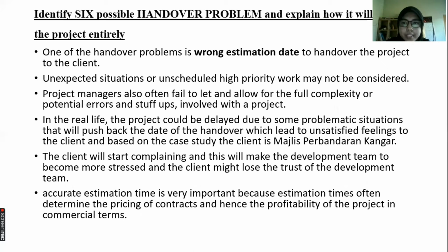Next, identify a possible handover problem and explain how it will affect the project entirely. In my opinion, one of the handover problems is a wrong estimated date to hand over the project to the client. Unexpected situations or unscheduled high priority work may not be considered. Project managers also often fail to allow for the full complexity or potential errors and setbacks involved with a project. In real life, the project could be delayed due to some problematic situations that push back the date, which leads to unsatisfied feelings in the client, and based on the case study, the client is Majlis Perbandaran Kangar.